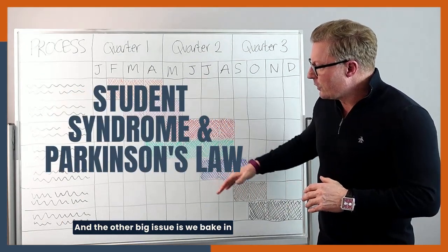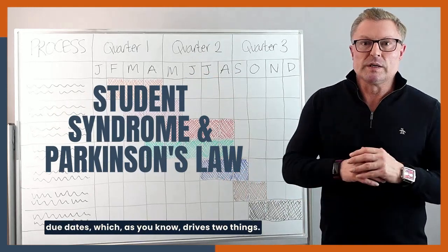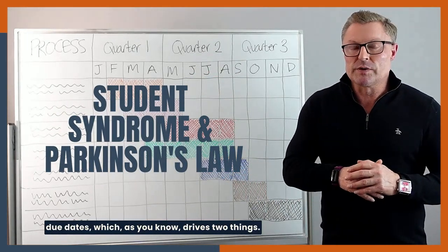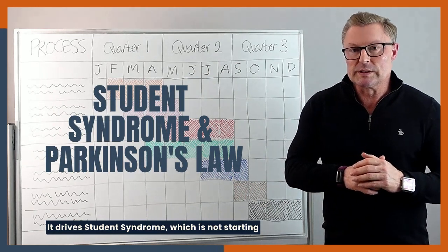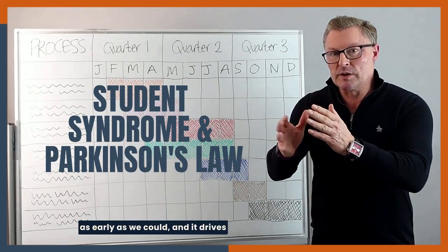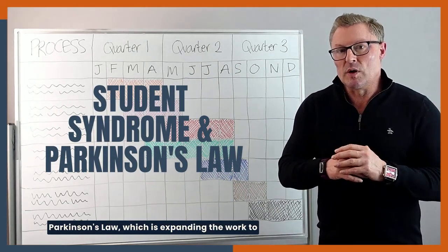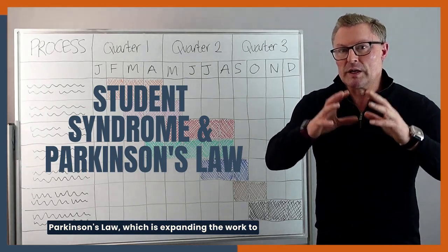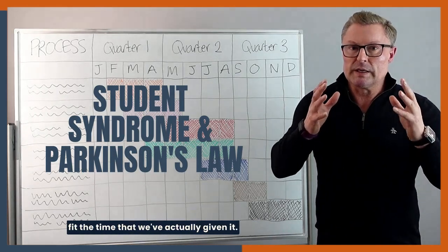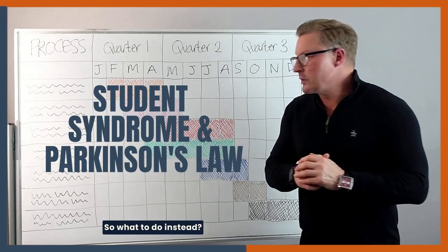And the other big issue is we bake in due dates, which, as you know, drives two things. It drives student syndrome, which is not starting as early as we could, and it drives Parkinson's law, which is expanding the work to fit the time that we've actually given it. So what to do instead?